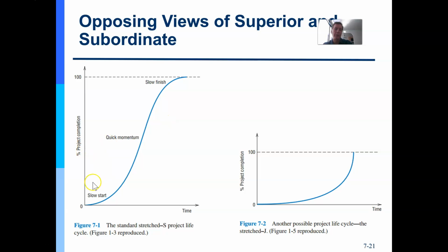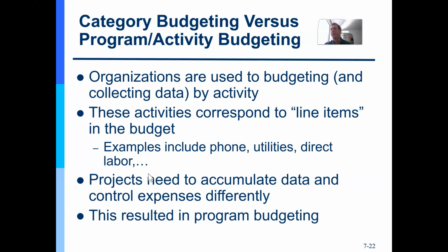And so you'll want to make sure the project baseline is what is known as time phased. So notice the time across the horizontal axis at the bottom. You'll want to have your budget by quarter, by year, depending on what you decide to break it down into. That's neat. And manage your budget in a time phased approach as you complete your project. So according to this, at about 80% of my project, I should have it done in this amount of time, whatever unit we decided to give that on the vertical axis.